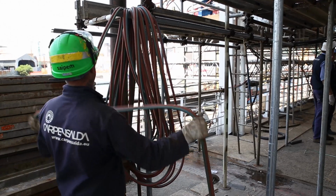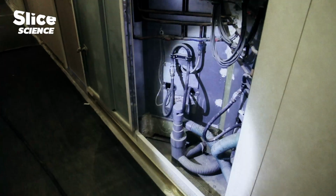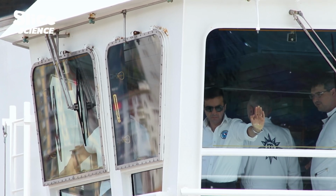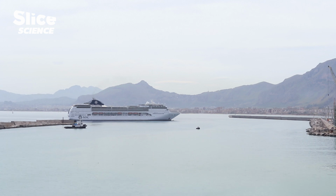The new hydraulic and electrical systems must be tested while the ship is in the dry dock, before they are tested at sea. If the systems fail at sea, it could be very difficult for the company to return the ship to the dry dock to continue work.